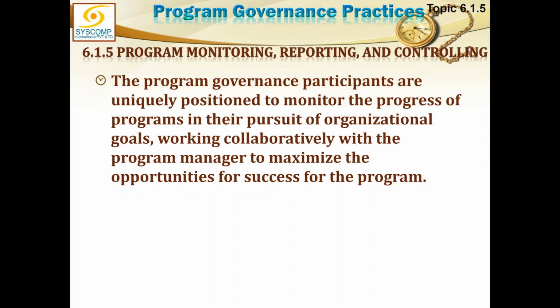So the program governance plan is for the overall program, under which we create the program management plan. We identify the components, and for these components, we provide a governance mechanism which is not the same as the program governance, but component governance or project governance. This project governance guides the project manager to develop his own plan. So this string of governance is connected down to the project team.